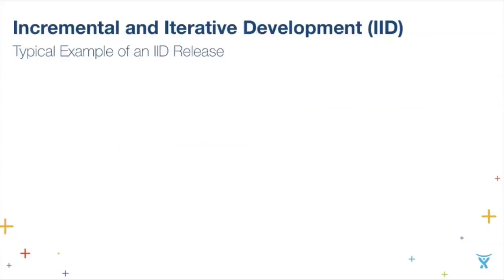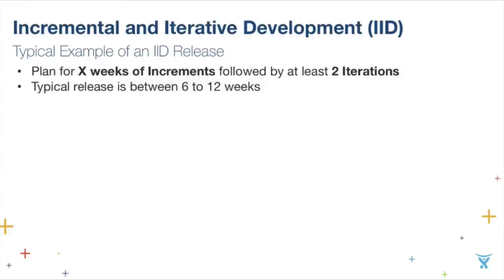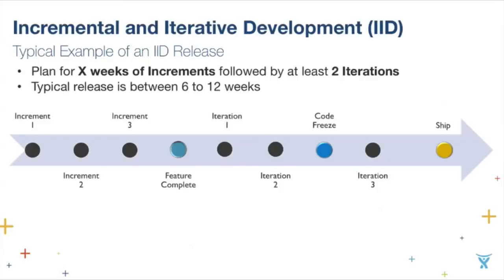Let me give you my definition of IID. A typical release will start with X weeks of increments, followed by at least two iterations — typically a six to twelve week process. Increments are the brand new code you're promising to deliver in a release — the new features you're going to develop. Iterations are where you iterate on features you may not have understood the right requirement for — refactoring that requirement. A typical release starts with three increments, then a phase gate called feature complete, followed by iterations refactoring misunderstood requirements, then a code freeze, a final regression iteration, and you ship that last golden build.